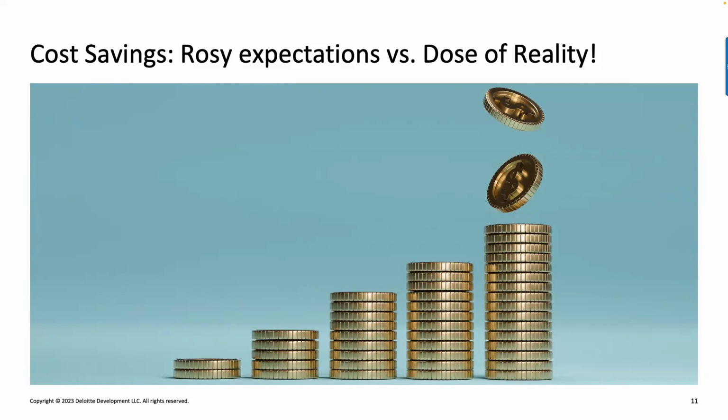You discover that, oh, there are anchor workloads that cannot move to the cloud. Oops, your data center has to stay now. So that $100 million that you took out from the business case, it's no longer valid. You have to go back and factor it into the business case. So what happens to your business case? Basically, it doesn't look good, right? So that's why we ask clients, what are the true elements that you want to include here, and start pressure testing that, start throwing rocks at it. If it stands the pressure, great. If it doesn't stand the pressure, you have to be very conservative as part of the estimate.